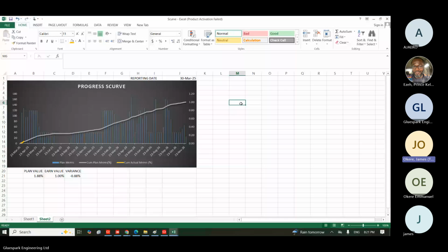Why? Like I've seen a situation whereby somebody wired a house, right? And eventually he powered it with a generator. It was working fine without knowing that there is no bridge between the changeover to generator and light. Then NEPA, when they brought light, the generator had to give way. Automatically, the generator had to blow, right? So now, had there been a pre-startup review, it wouldn't have happened. Somebody would have figured it out, right? And said, no, this connection was not separated, right? You understand? Yes. So that's the need for the PSSR.